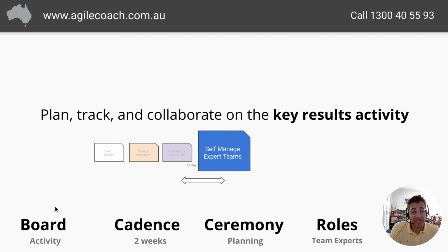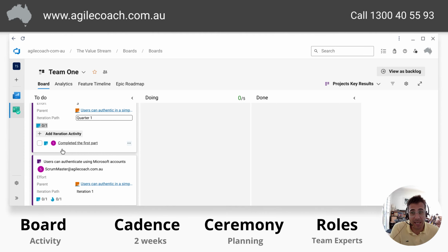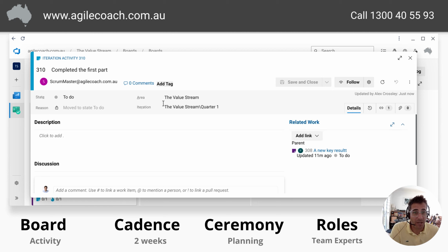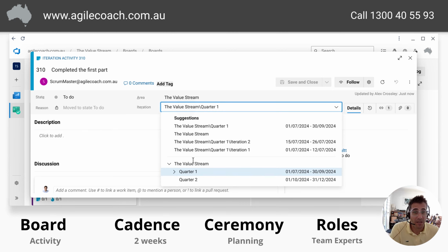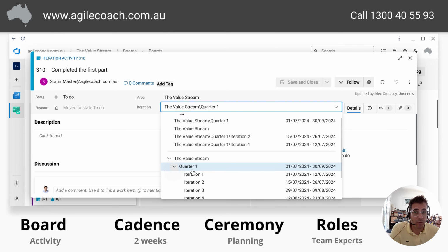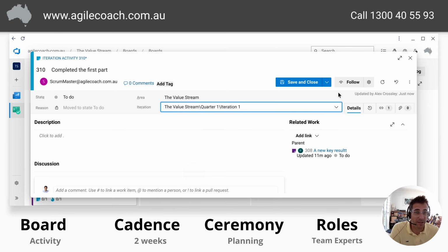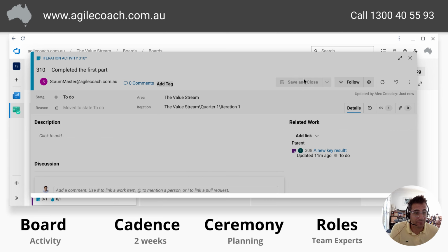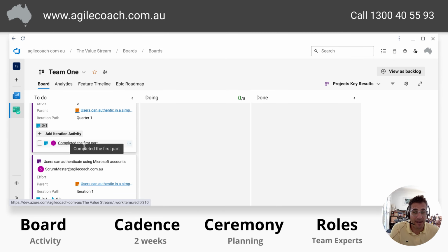The planning is, can we get this delivered in the next iteration. So if we go to here, really what we're going to be doing there is we're going to open these things up. We're going to see what the size of it is. This card hasn't got the size on, and we're going to commit it to an iteration. So this one would be committed to iteration 1, for instance, which I think is actually done. My dates are out of date there. And then we look at that.